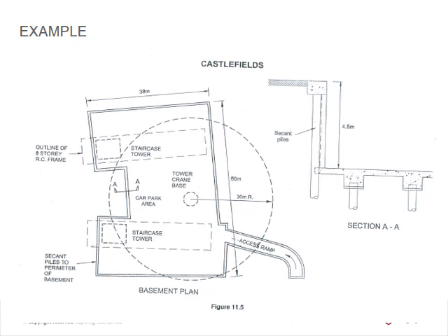The excavation works in association with removal of spoil to reduce the ground to the required level, allowing construction work to basement piling and floor to commence. Construction work includes pile caps and bases within the basement area. The basement excavations take place between the secant pile wall. Access to the 5 meter deep basement is via the proposed access road. So here's the access road that they've got planned.